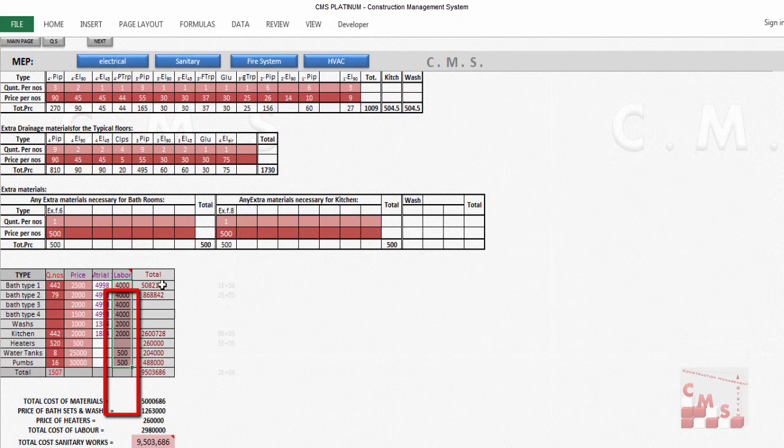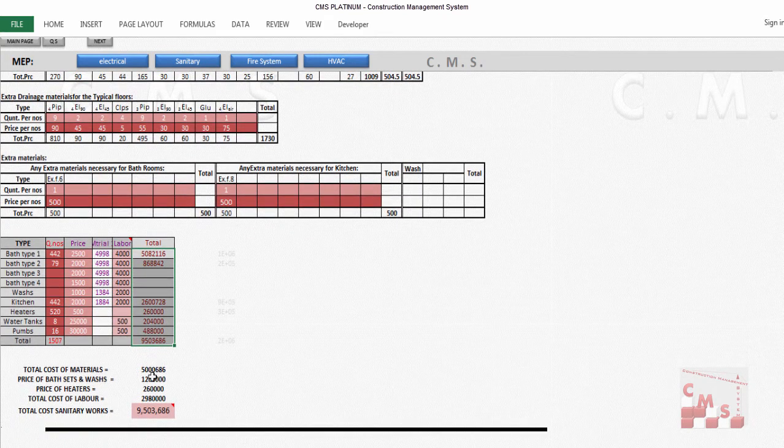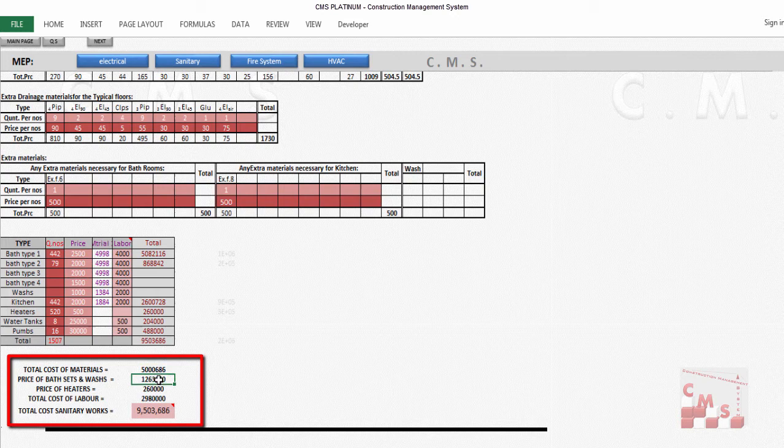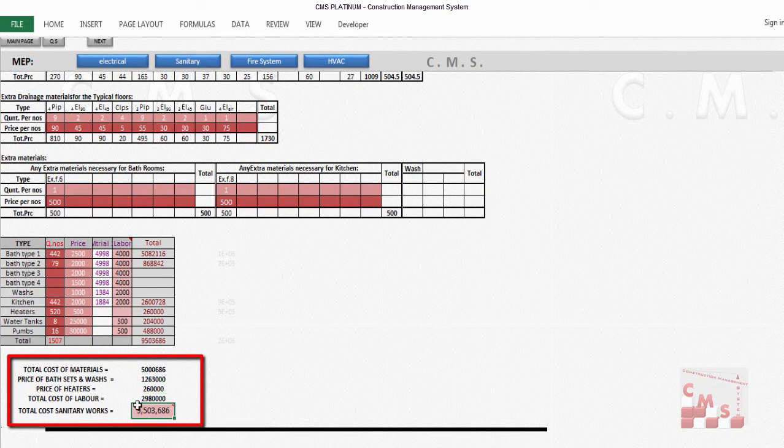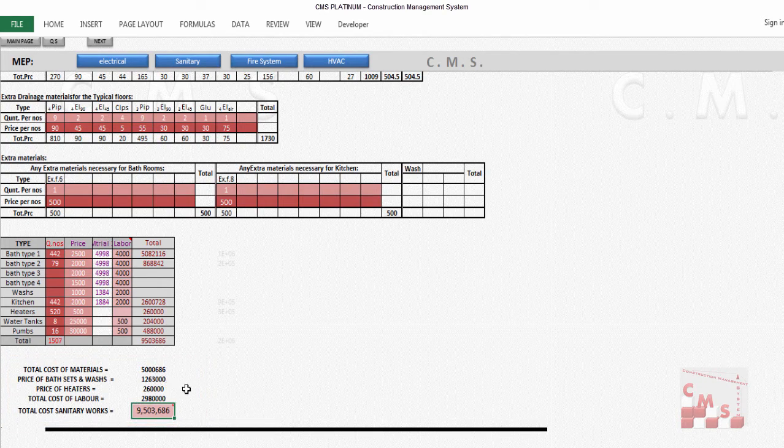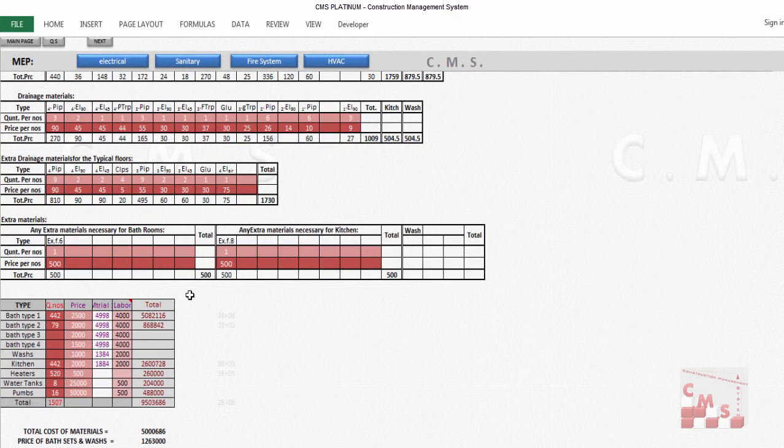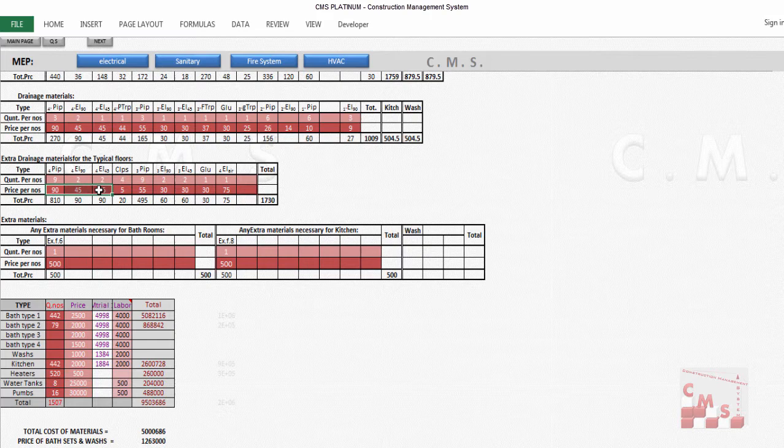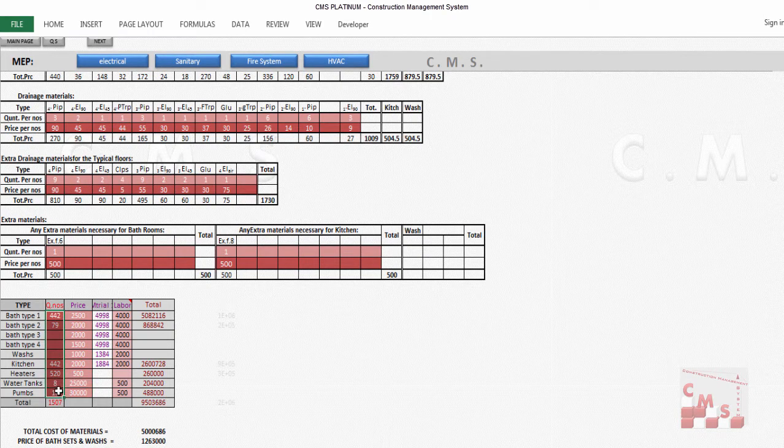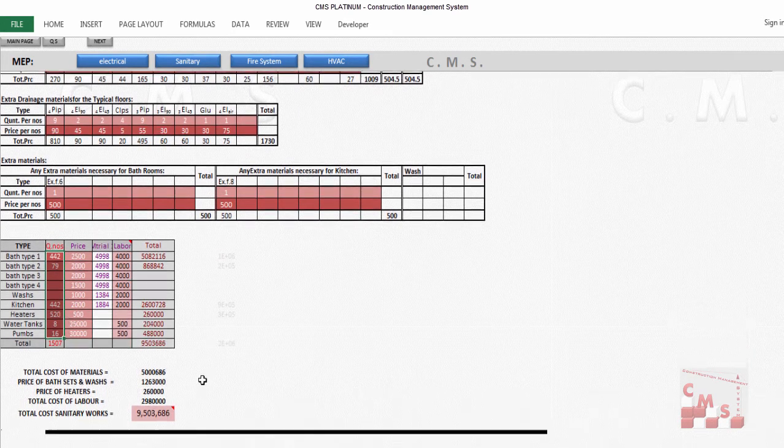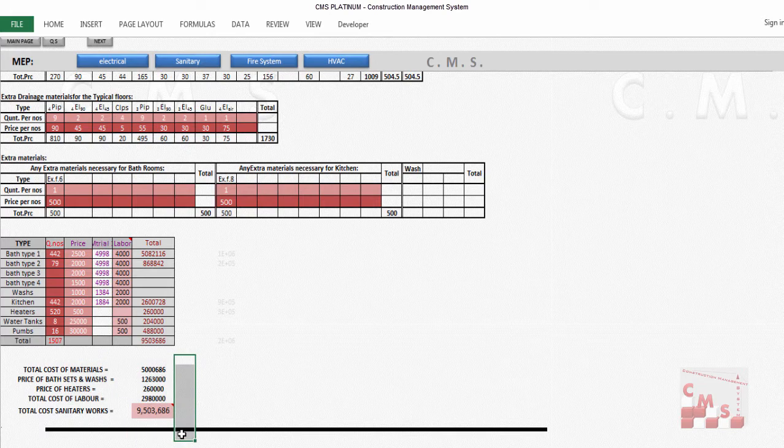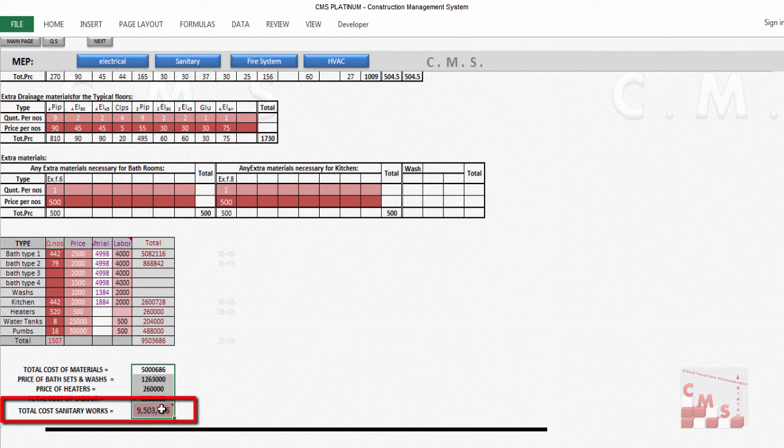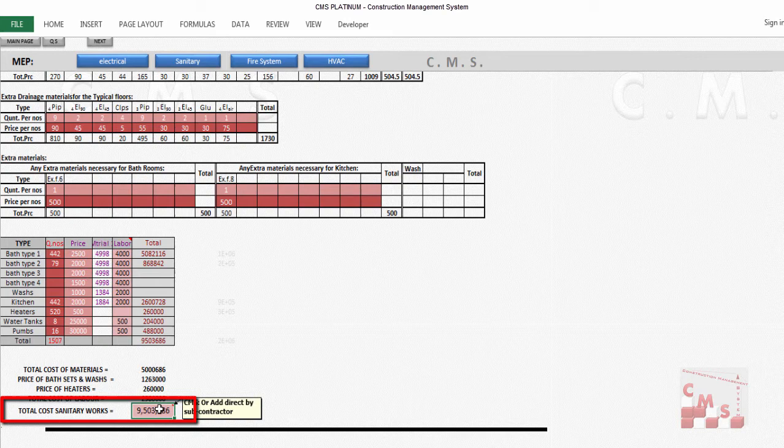At the end, you'll have the full cost estimation for the project divided by material, bath sets, heaters, and cost of labor. At the end, you'll have the full price or full cost of the sanitary and water supply work. Mainly, you can use CMS directly by inserting the price for material and numbers of kitchens, bathrooms, and other water facilities. At the end, you'll have this price directly, or you can add here directly the price from subcontractors.